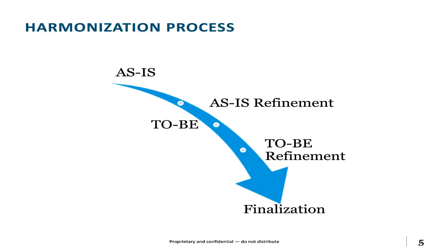Once everything is finalized, you're able to now develop a project plan. Since you've identified project priorities, you're able to construct plans in tools such as Microsoft Project that highlight those elements that bring the greatest business benefit. Those are earlier in the project plan. Those are in the first phases of the project plan. And this is how we try to economize the overall execution of the project.